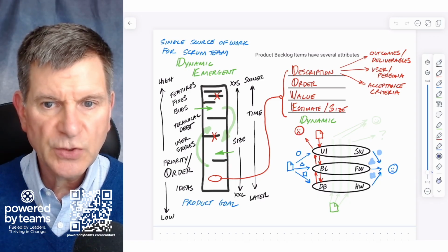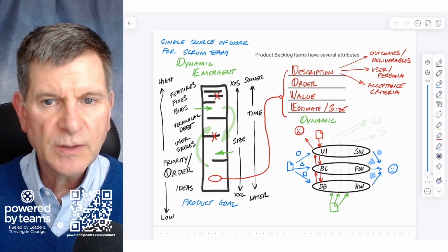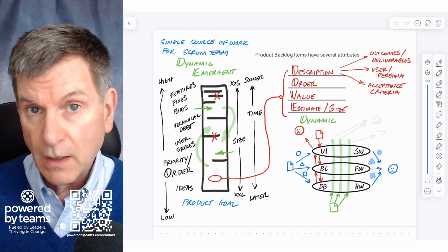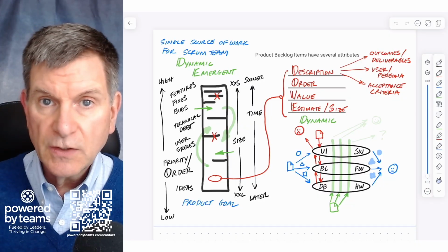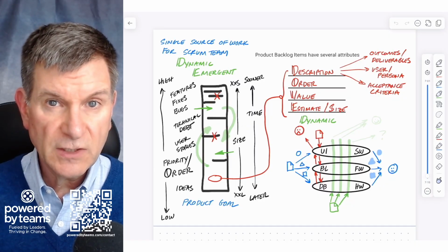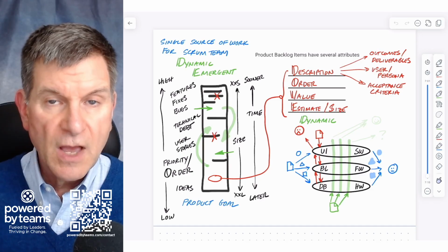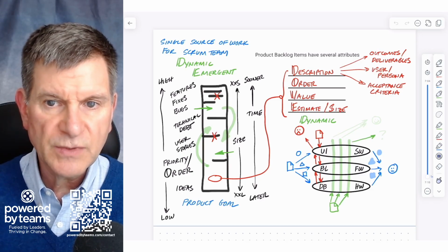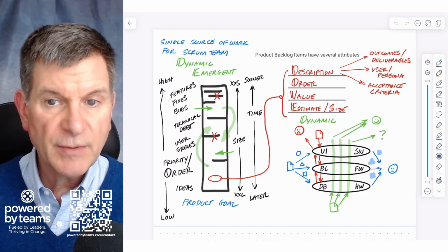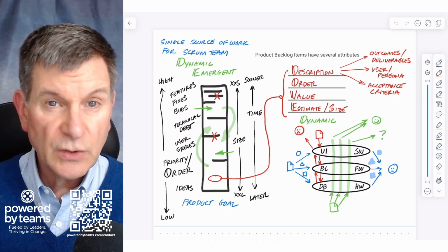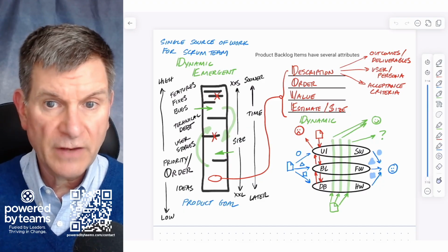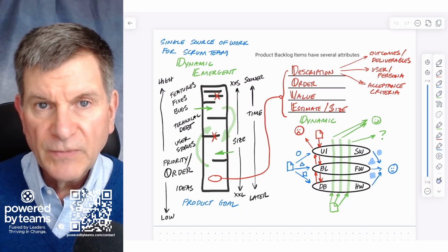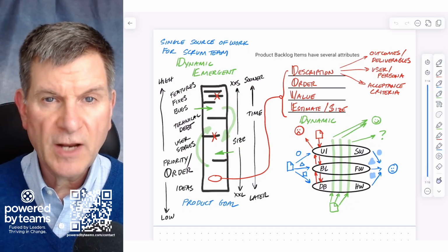Here's a better way. What you want to do is take those requirements and break them into thin vertical slices of value. You also want to frame your teams so that they've got cross-functional skills to be able to deliver those slices of value. This is one of the ways that Scrum mitigates risk, because if one team has some problems and isn't able to get out that slice, maybe some of the other teams did, and you get some value instead of having to have handoffs in between the layers. So this gives you a pretty quick overview of a bunch of concepts in the product backlog.